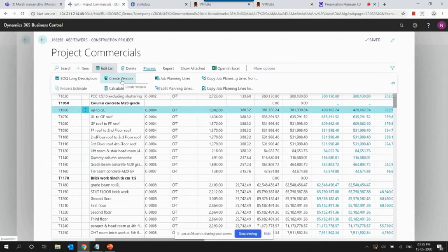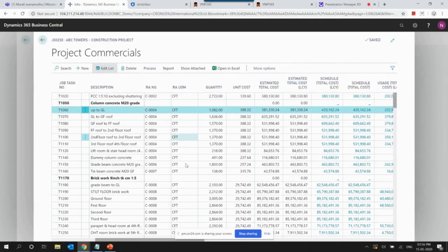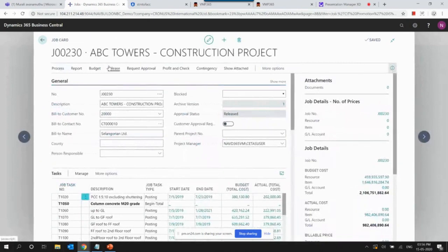Let's say whenever there is a budget revision, or whenever a non-tendered item, or NT, comes into a project, or a variation comes into a project. For managing any such variations, we have a provision called an archival mechanism, and you can do n number of archivals. And talking more about project control, whenever somebody is changing the budget, we will be able to enable an approval mechanism for it. So this is where one of the key project management activities of controlling the project comes into the picture.